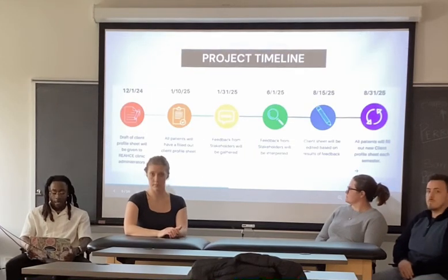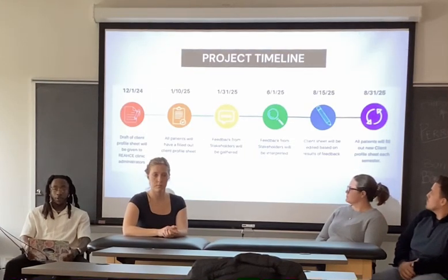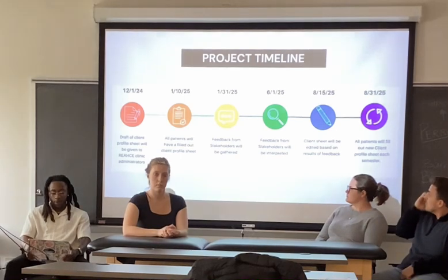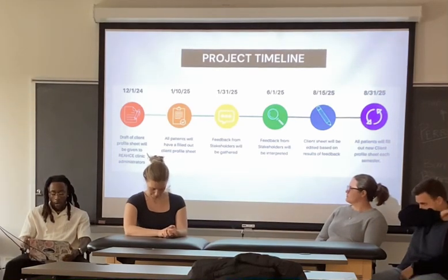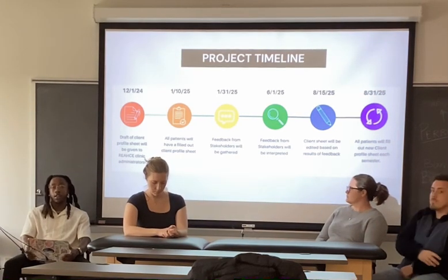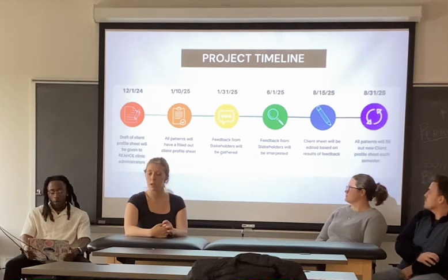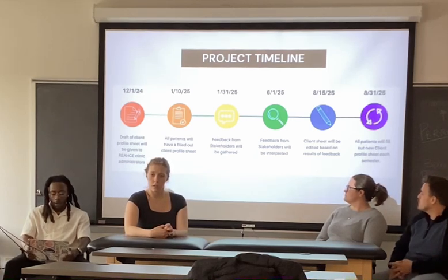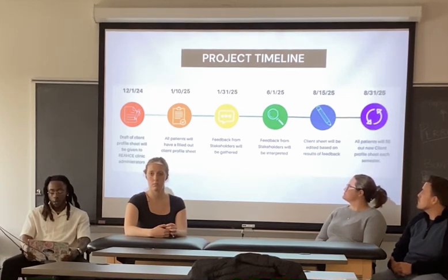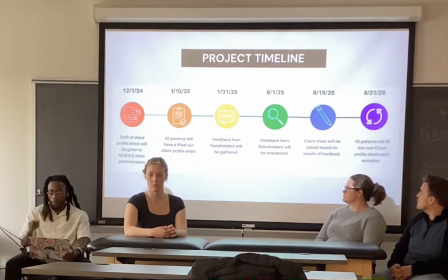Alright, here's our project timeline. By December 1st of 2024, we were looking to have a draft of the client profile sheet, and that will be given to the administrators at the Reach Clinic. By January 10th of 2025, all patients will have filled out the client profile sheet. By January 31st of 2025, feedback from the stakeholders will all be gathered.